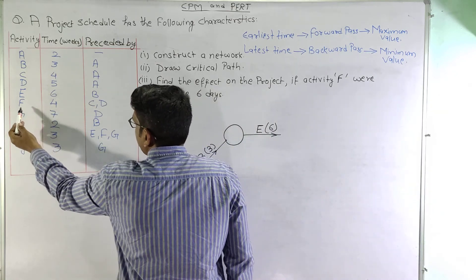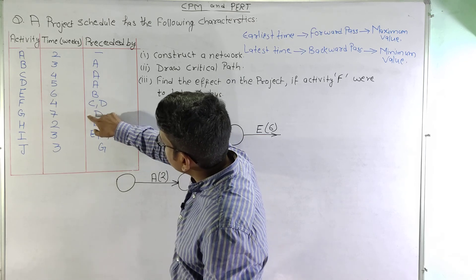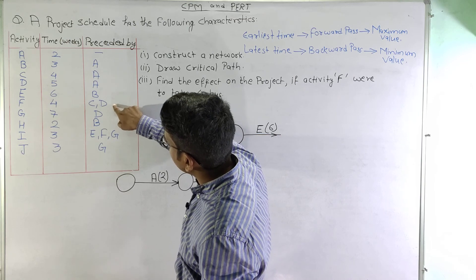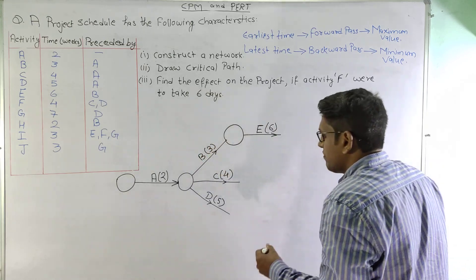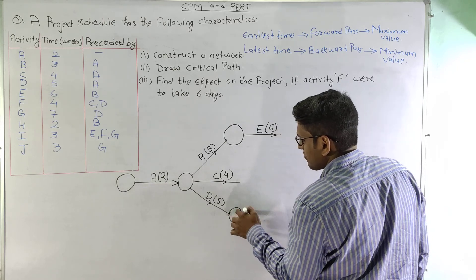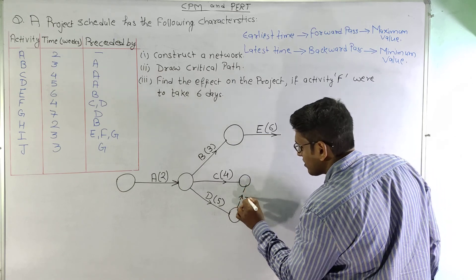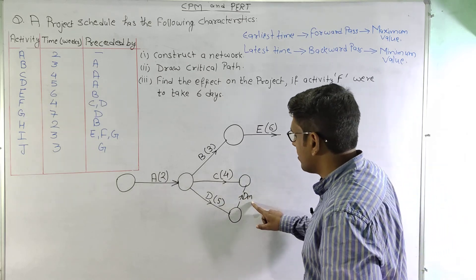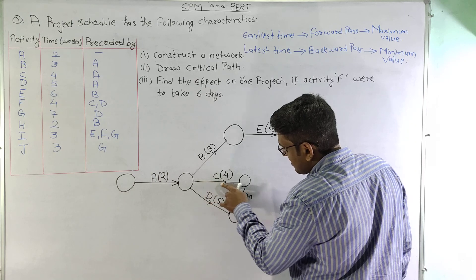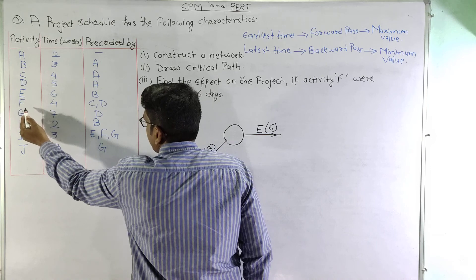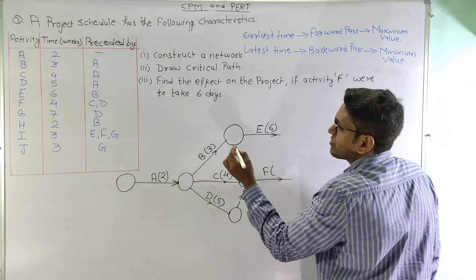Moving on to activity F, activity F is preceded by both C and D. Looking further, another activity is also preceded by D and C. So there will be a dummy activity for these two. We end activity D at one node and activity C at another node, and draw a dummy activity from D to C. At the D-only node, only activity D is completed, and at the C-D node, both C and D are completed. We start activity F from there, as it is preceded by C and D, and it consists of 4 weeks.